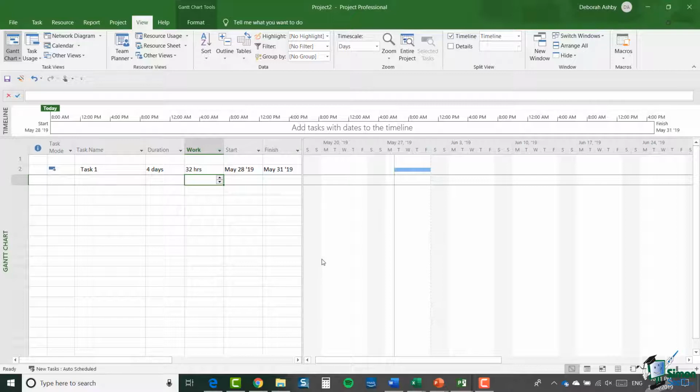So if you're halfway through, that doesn't necessarily mean you've achieved half of the value. And you also need to know the cost of what you've done. Again, you may be halfway through the duration of the task. That doesn't necessarily mean that you've used half of the amount of cost that you'd allowed for. You may have used a lot more than half the cost, in fact. As I say, you may have had 2 people working on it instead of 1. So a key aspect of earned value analysis is the ability to look at both cost and value. It's no good just looking at one or the other. You have to compare the two. You have to look at both.